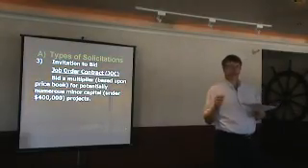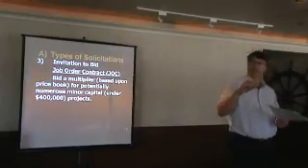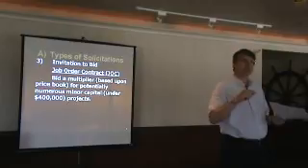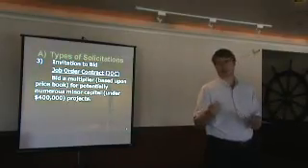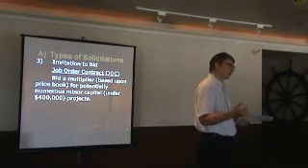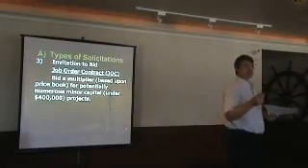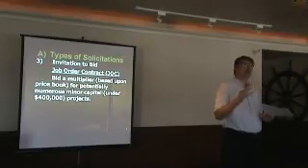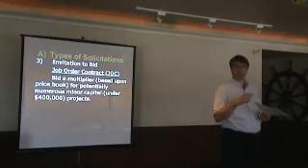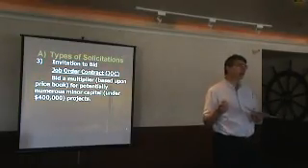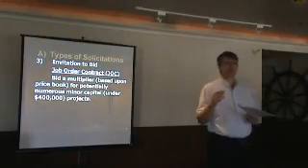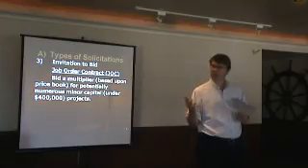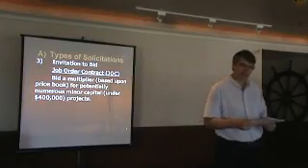So if the price book said a cover plate for a light switch is $1, then the job contractor would really do it for $1.10 or $1.30, whatever the multiplier is. Now we're seeing JOC come in, on other campuses, at 0.7, so 70% of the published rate. On our campus, we tend to see it closer to the 80 to 97% range. So again, it gives you a feel of the market out there.